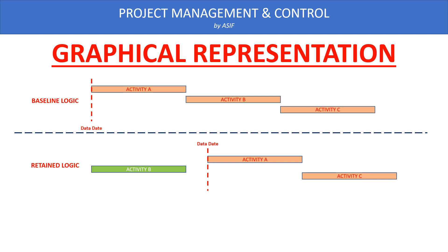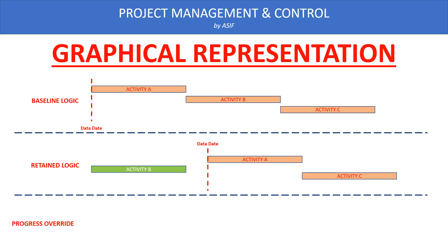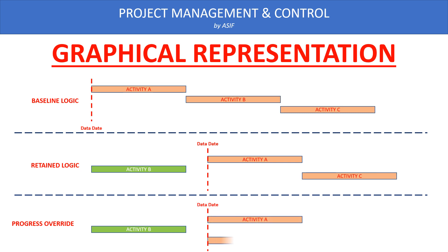Under Retain Logic, since A is linked with B and B is linked with C, any delay in A will flow through to B and then to C. In Progress Override, the delay of Activity A will not show in the future activities — Activity B and C can start at the same time, and the delay of Activity A only affects Activity B, which is already completed. So this delay will not impact the program calculations.